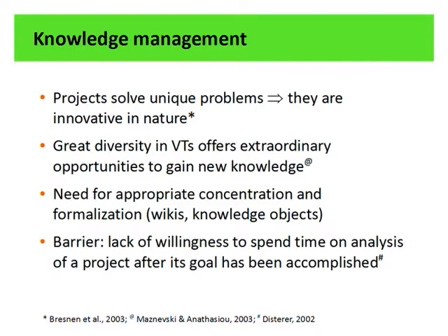A usual barrier of knowledge management is that team members are usually not willing to spend extra time at the end of a project analyzing and summarizing what they've learned while working on the project. And also the management usually want to use the human resources on other projects, and they often overlook the importance of the stage of knowledge summarization.